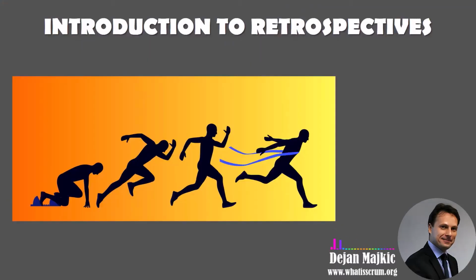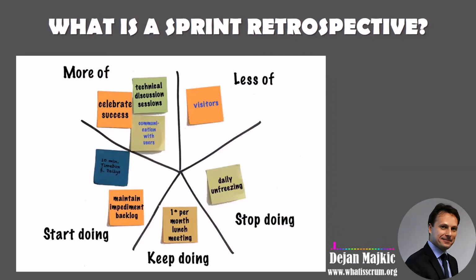In a Sprint Retrospective, this is done by reflecting on what happened in the last sprint. Timeboxing and sprint planning as a practice introduce the idea of organizing your time into small manageable chunks. After those time-boxed chunks, at least in Agile product development, it's important to also have a planned self-appraisal session. And this is Sprint Retrospectives. In a Sprint Retrospective, the insights learned from the team self-appraisal are then applied to the next sprint, which allows the product development to regularly improve.